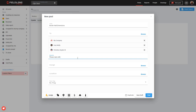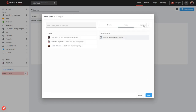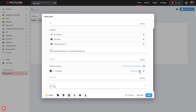I'm going to say please reply with mentions for parking lot border wall. I can type as much as I need in there. Then I have the option to assign this post to an individual or multiple individuals. If this post doesn't require any action from anyone, I may not need to assign it to someone. But in this case, I need someone to tell me what the dimensions of that border wall are. So I'm going to go ahead and browse — I may want to select my subcontractor company, maybe my masonry subcontractor, or I can select a particular person from my project team. We'll go ahead and hit Done. Now we've added Carrie as an assignee, and I can choose to give her an individual due date, or if I've added multiple people, I can set a due date for all assignees by clicking on one of these calendar icons.